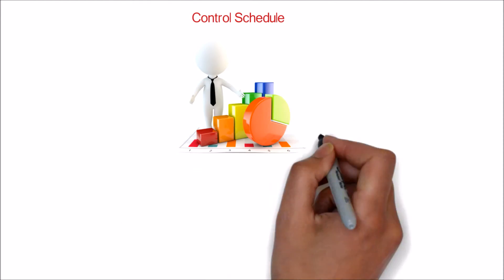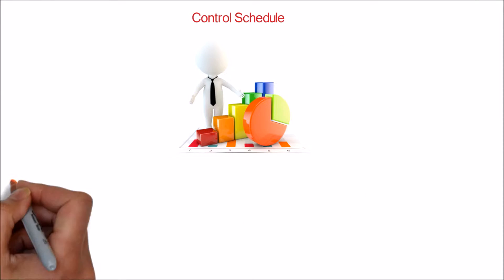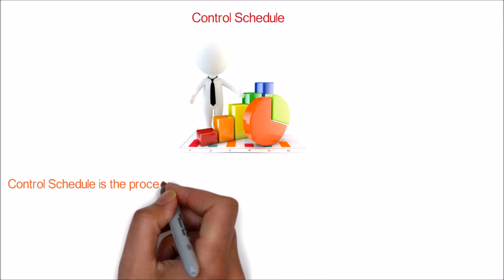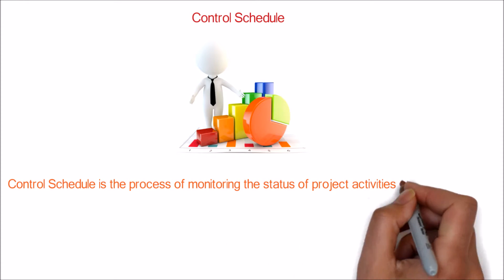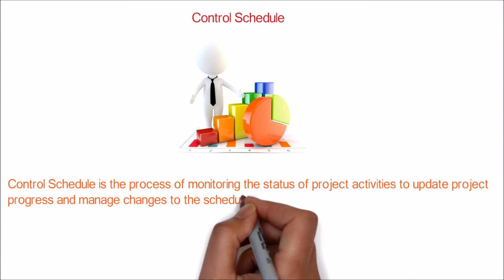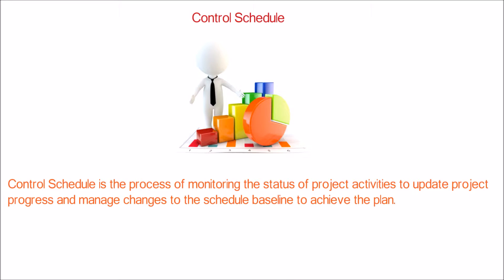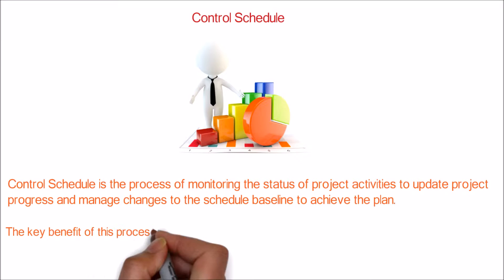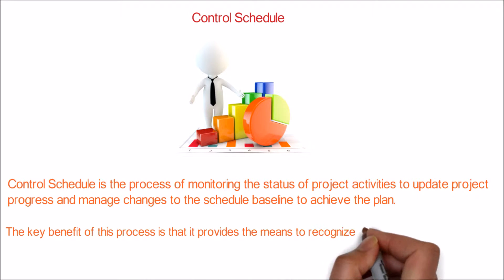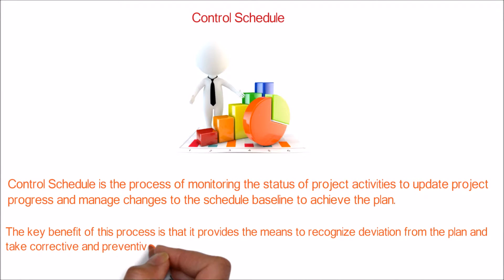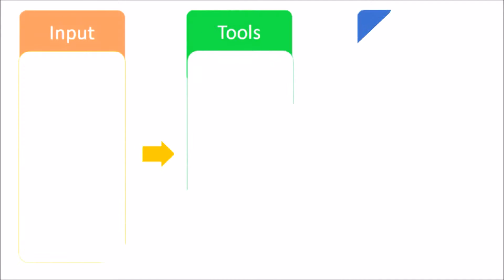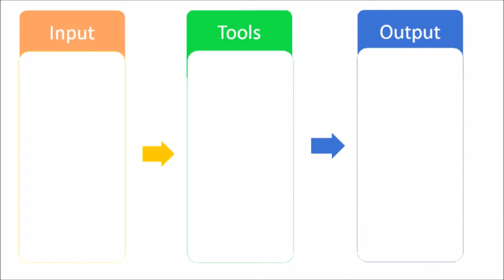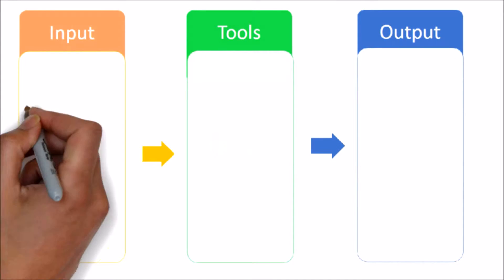Let's learn about the process of Control Schedule. Control Schedule is the process of monitoring the status of project activities to update project progress and manage changes to the schedule baseline to achieve the plan. The key benefit of this process is that it provides the means to recognize deviation from the plan and take corrective and preventive actions, and thus minimize risk. Let's see the inputs, tools and techniques, and output of the Control Schedule process.